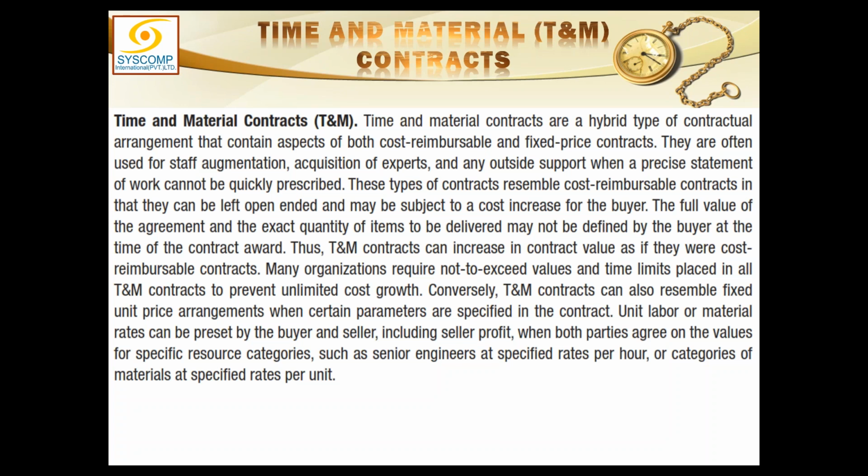Like you hire my services for your company to conduct a training. I'll charge your company on an hourly rate, and on top of that I will charge you separately for any training material being provided or the certificates provided at the end of the course. So there is a cost for my time and there is a cost for the other materials which I provide. This is called a time and material contract.